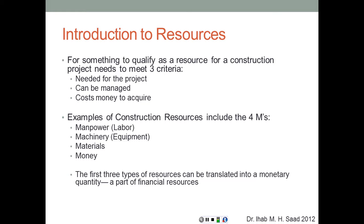Examples of construction resources include the four M's: manpower (labor), machinery (equipment), materials, and money — the most universal resource, since it can be translated into any of the other three. Hiring labor, purchasing or renting equipment, and buying materials all cost money, so the first three resource types can be expressed as a monetary quantity.